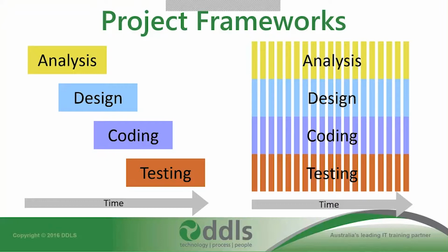When we start talking about an agile project, what we're going to do is almost mini waterfalls, is how I like to talk about it. You do things in shorter periods, from 2 weeks to 6 weeks, and you do all of your analysis, your testing, your designing, as well as your builds, sometimes deploying depending on the organization that you're in, and you do that in the smaller chunks.